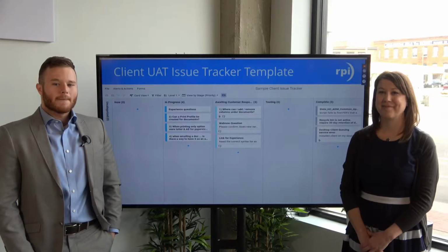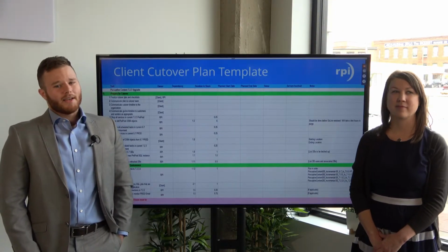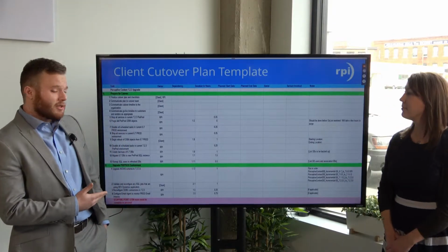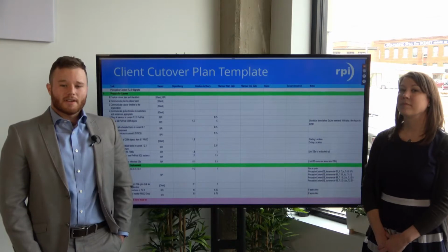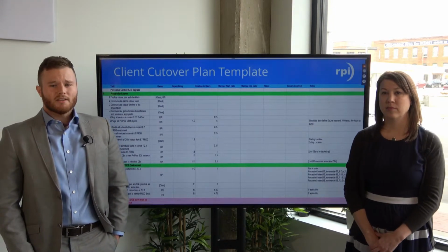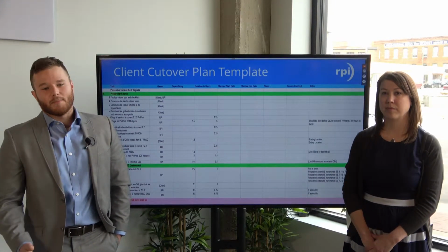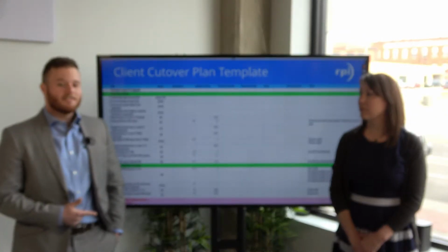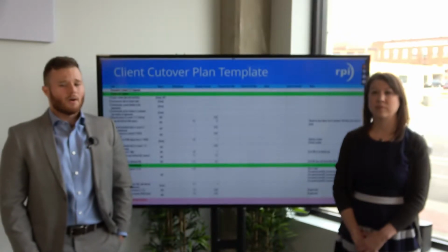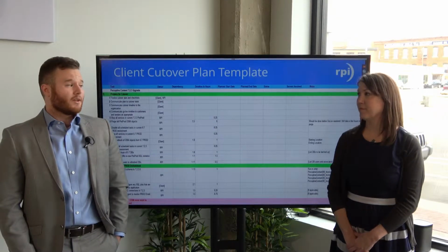Finally, we come to the last part of the dashboard, the cutover plan. The cutover plan is something that's provided as a template version at the beginning of the project and will look similar to what you see on the screen here. As the project progresses through user testing and a go-live date is solidified and locked down, your consultant will begin building out the cutover plan according to the specifics of the project. For example, adding in steps regarding iScript conversions, filling out the servers involved, etc. There will be a call before go-live where the consultant will sit down with the client project team to review times and roles.